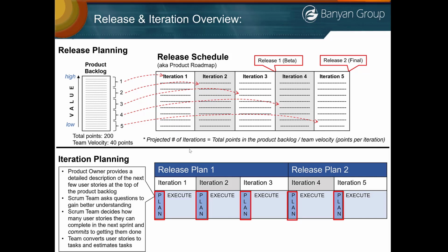In Agile, we come up with an initial high-level plan, we come up with our user stories, we put our relative estimates on those user stories to get a general understanding of approximately how much work is there. That allows us to create a release schedule fairly quickly. And then when we start to work our way down that product backlog, starting from the high value features at the top and working our way down, then as we select an iteration of work, the team does detailed planning at the beginning of each iteration. So Agile projects do detailed planning, they just spread it out and do it iteration by iteration.